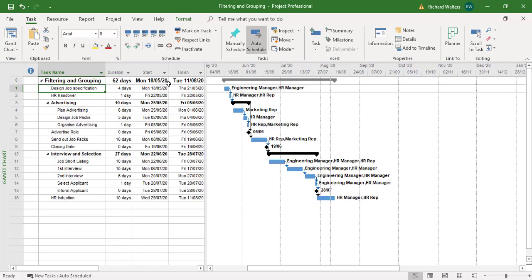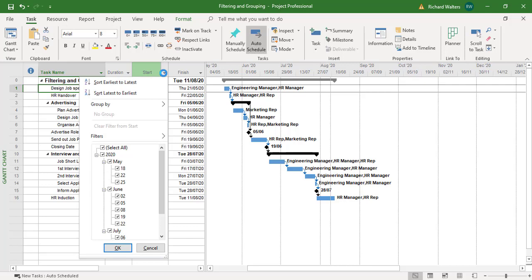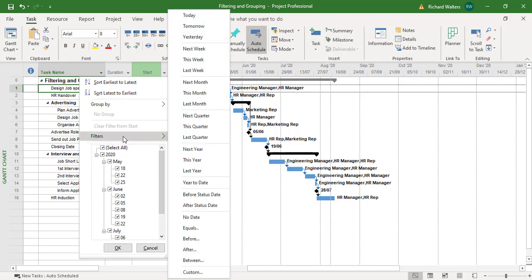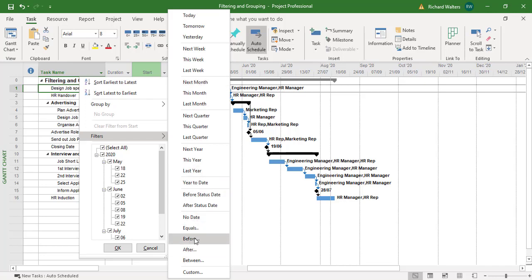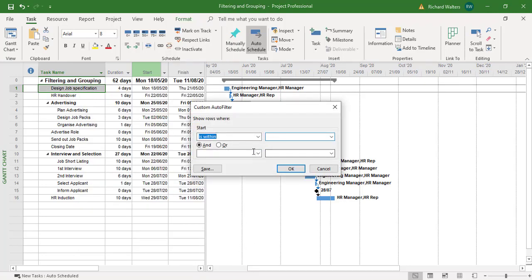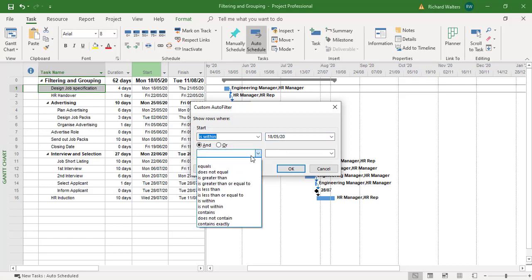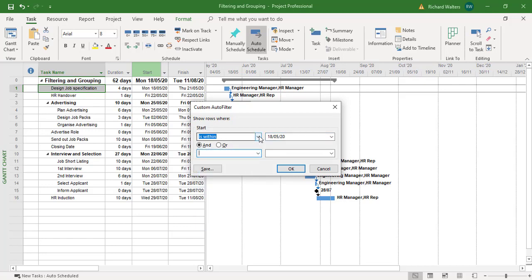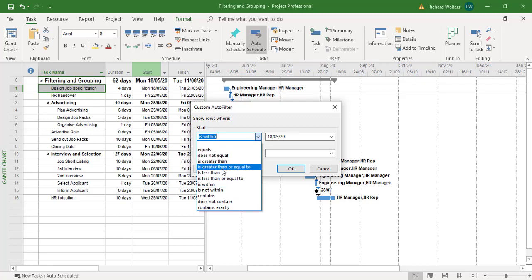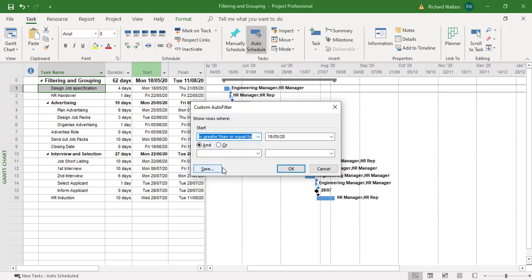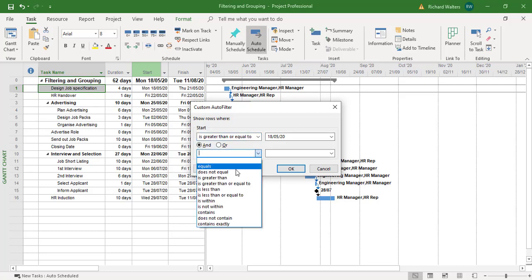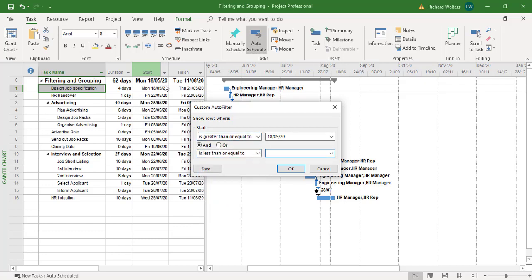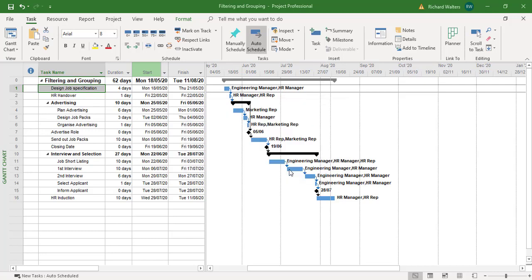We could look at start and same idea again. Starts within the last, next month, last month, starts before, starts after. So I want to say between 18/05/20. I want to say that is greater than or equal to and less than or equal to. Let's say the fifth or the sixth. So 05/06/20. And there we go.